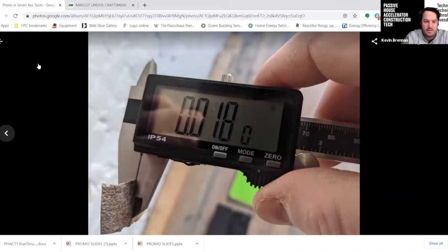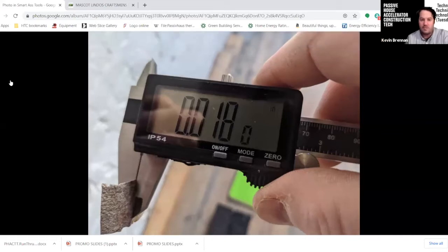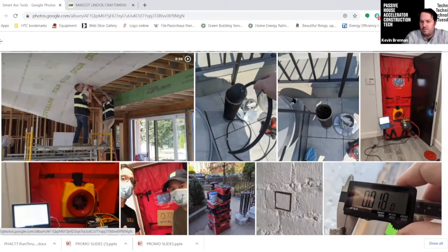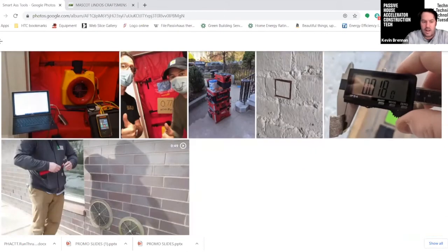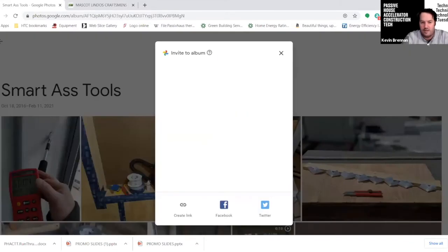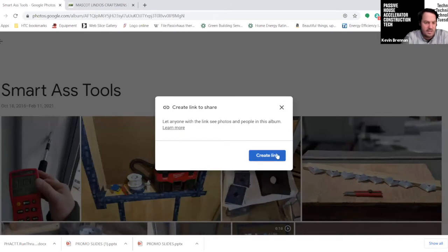So for example, say the product is 60% solids, 40% is going to flash off in the air. So what should be left from the wet mil thickness is 60% of that whole number. So this is from our other project. It was pretty good, but it's a way to let the guys on your team know, and also anyone doing the subcontract work, that you're going to be checking them and making sure that's there. I'll share the link to this in the chat if anyone wants to take a look at it or watch the videos.